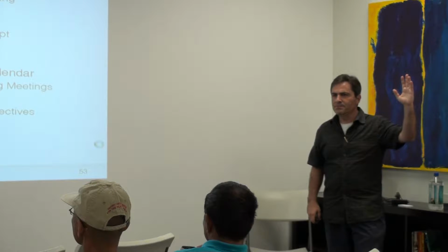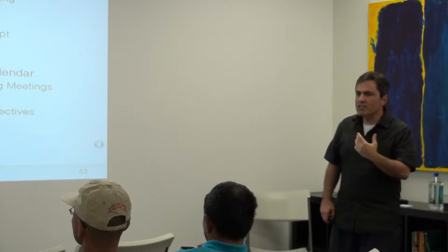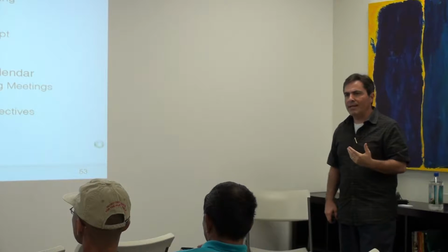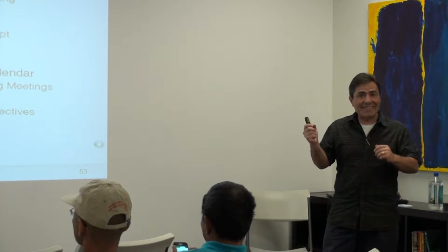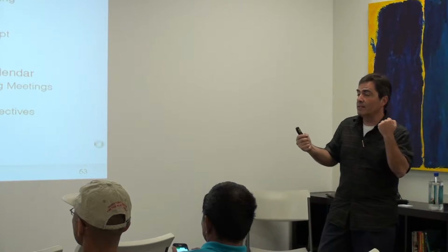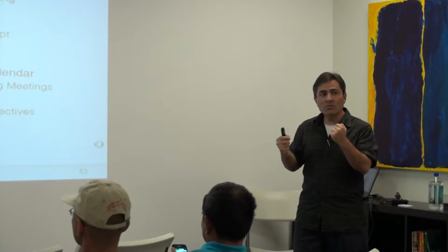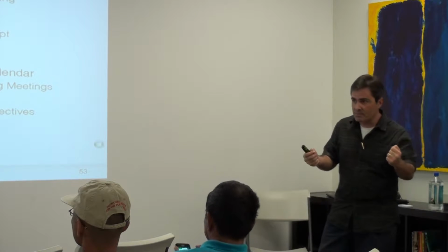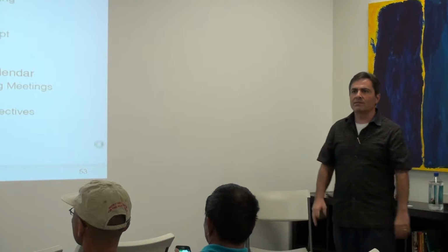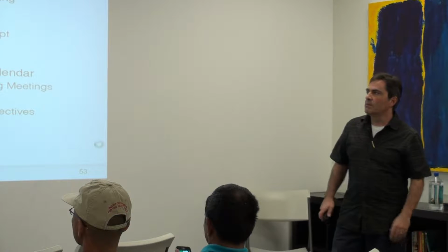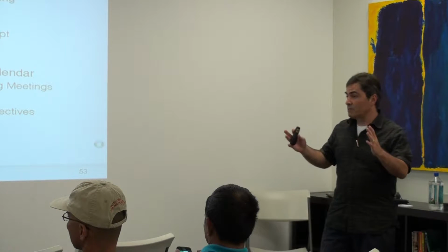Anybody here a project manager? Okay, so project managers spend a lot of their bandwidth trying to figure out, well, when can we get together and plan? And here we're talking about getting everybody together, everybody in the program. This is typically between 80 to 120 people in the same auditorium doing planning for 2 days. We're going to do that about 4 times a year. If you divide 52 by 10 and throw out the holidays, that's how many of these events you get a year. So these are program level planning, but they involve everybody in the program.